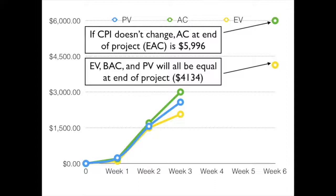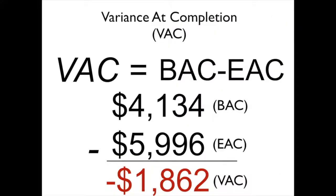So what we can do now is calculate what that variance is — how much are we predicted to be off from our estimates? Our variance at completion is simply the BAC minus the EAC. We take the difference between those two values, and in this case, it looks like we're going to be over budget by $1,862.